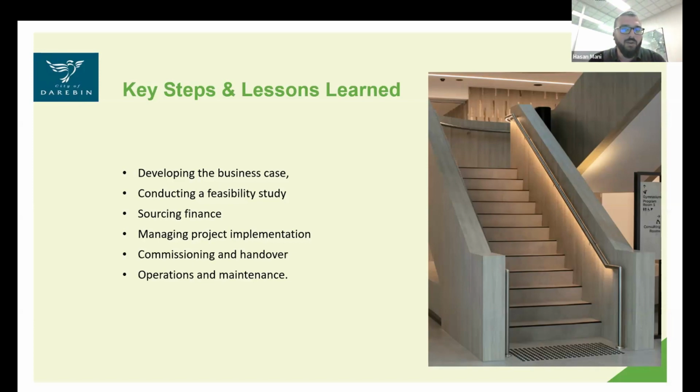And as a result of that, we found that council's security system was so far advanced and high spec that council cards will not be operating at this facility. So we had to update our card readers at this facility. The gym equipment, the lockers, and membership systems were operating on a different frequency to what council's frequency was. And through trial and error, we found some card readers that operated on 2 frequencies. So that's some of the design development and lessons learned throughout this project.